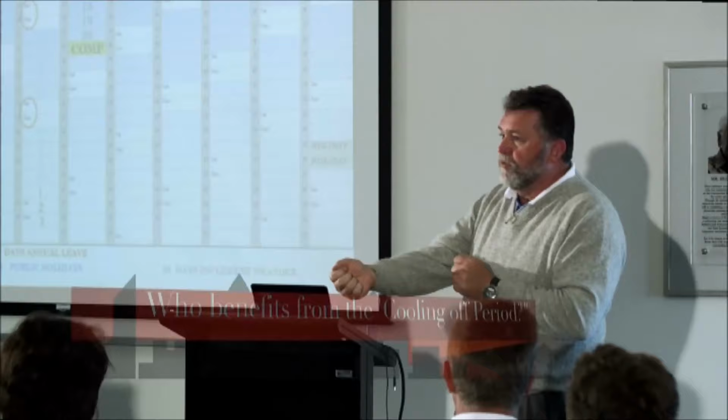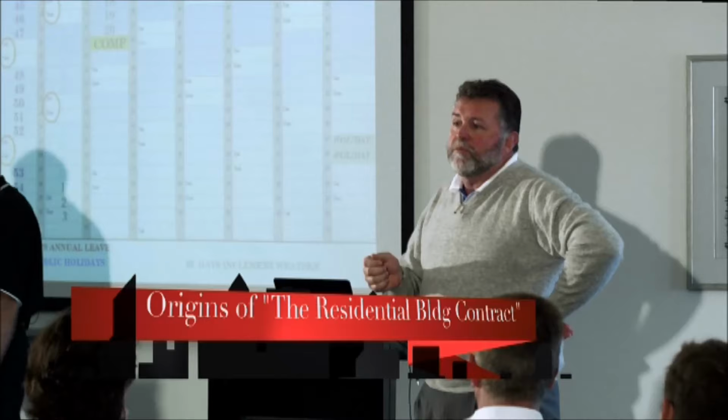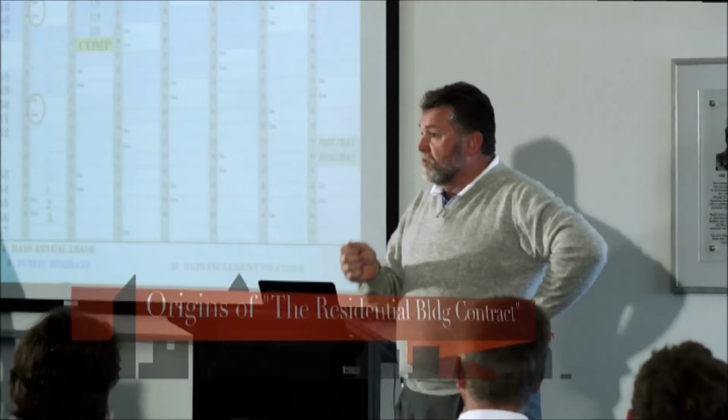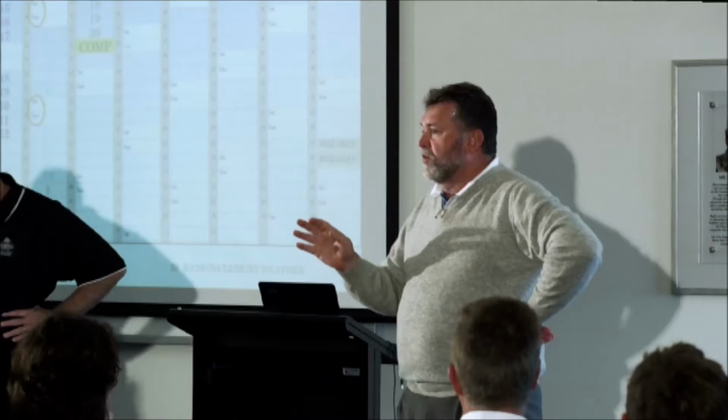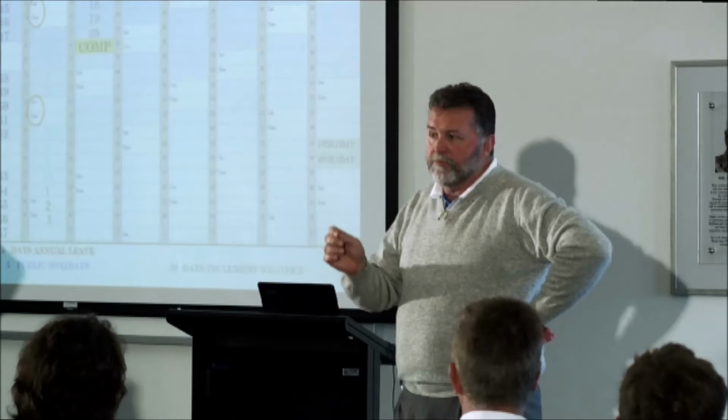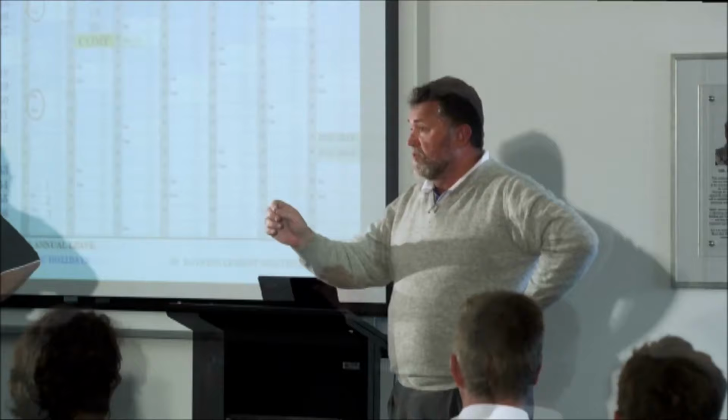Back in 1999, the state government did a review of the building industry, and it was because so many builders were actually putting a PC amount of $500 to clear sites, and there was never enough money. There was so much outrage by consumers, that's where it became you now must give a fair and reasonable price to do the job. And that's the right wording in the legislation, fair and reasonable. You've got to understand that the legislation was put in place as owner protection.